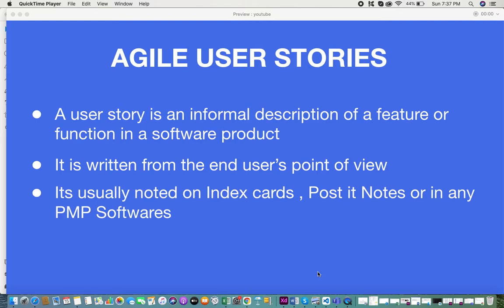Generally, when you receive a requirement, the first thing you do is jot it down on some notes, then maybe add it to an index card or a post-it note, and eventually add it into your PMP software. That's how requirements are gathered, noted, and then entered into your software. So that's a brief overview of user stories — now let's look into the format.